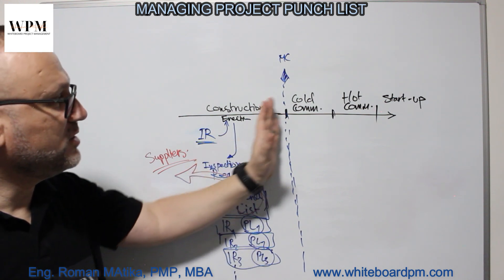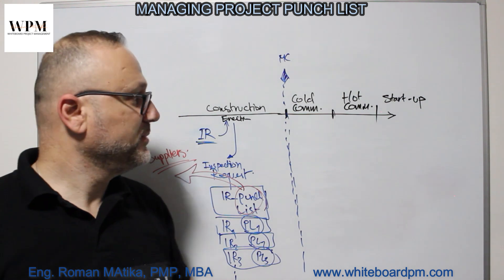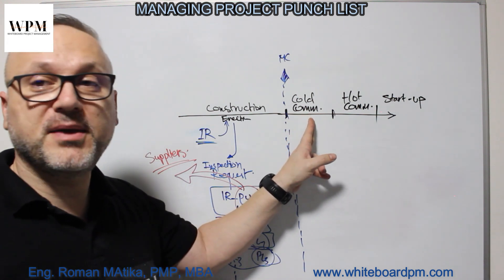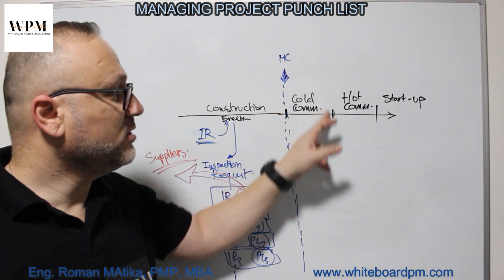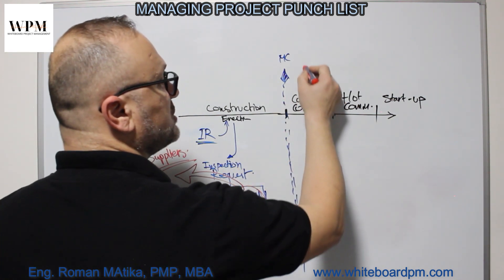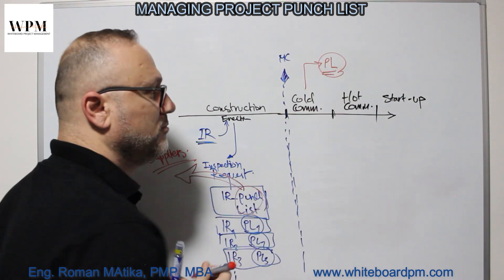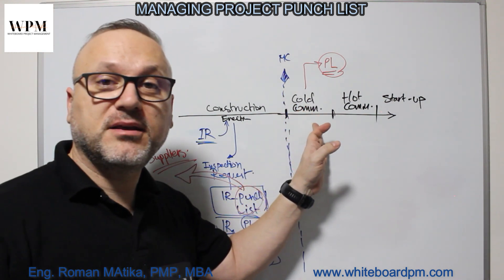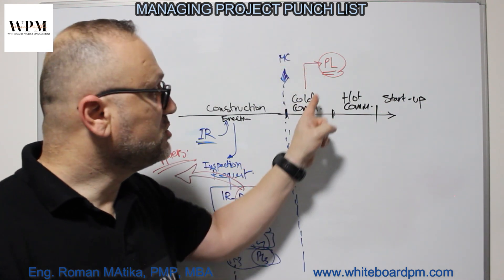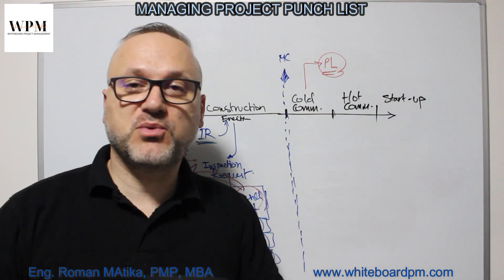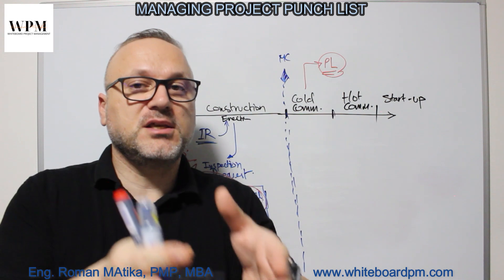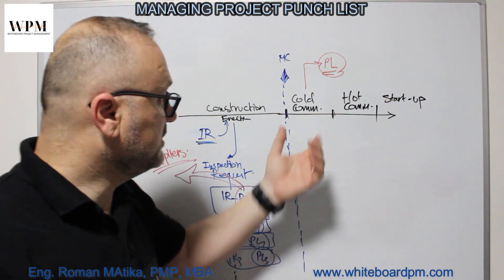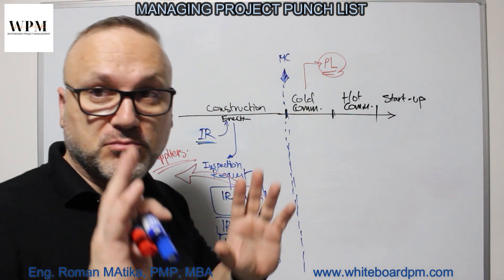Punch lists must be completed until mechanical completion. Once we go to individual testing of each equipment or material, we are in the cold commissioning stage and we also have some punch lists here — mostly for the suppliers. Because we are inspecting the equipment and calling the suppliers to come to site, to inspect the equipment and make sure it is installed according to the manuals, specifications, and project documents. Those are mostly the punch lists for the suppliers, but not all.